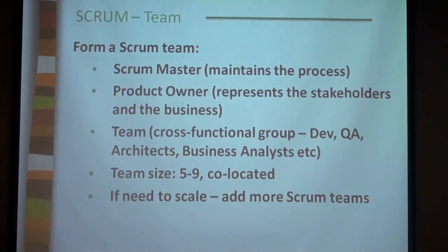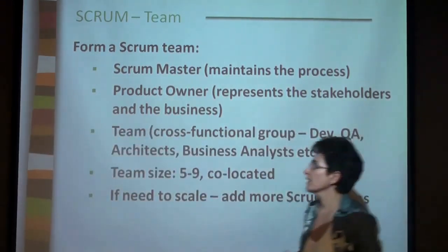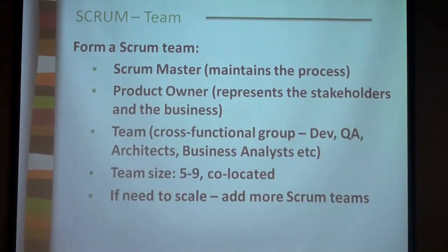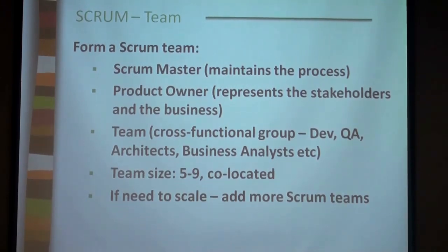So what will happen in this case, let's say this is the feature set developed by team A, and then you will have another team, team B, which will be developing its own set of features. And at some point, you will need to integrate. So you may spend 1 sprint integrating the 2 products.